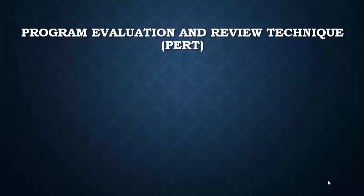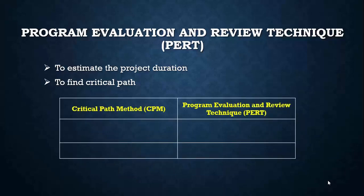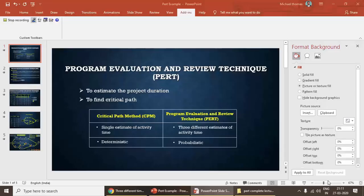Welcome to my lecture on Program Evaluation and Review Technique. It's a statistical tool used in project management to estimate the duration of a project. In my previous lecture, we saw how to use the Critical Path Method to find the duration of a project, where we have a definite duration for individual activities. In contrast, Program Evaluation and Review Technique has different time estimates for individual activities, so it is probabilistic in nature.